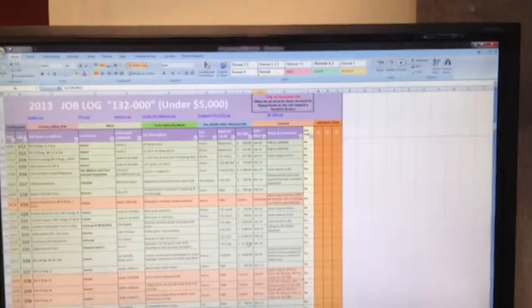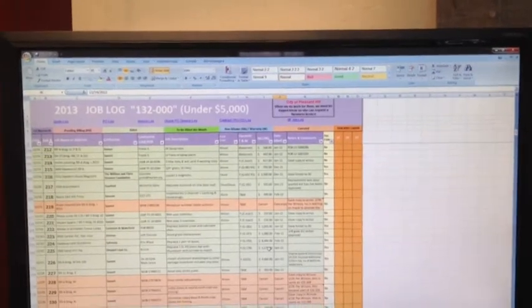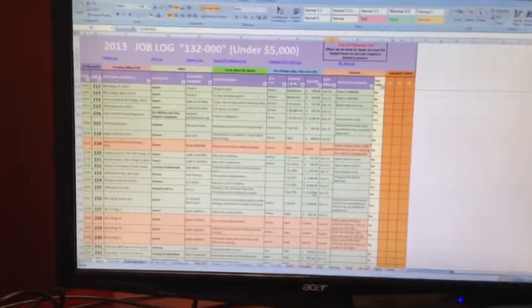They execute the work, and they start tracking any change order quotes, purchase orders, any other miscellaneous information that we need to track within this folder. That way, when we go to bill it, they have the adequate backup.